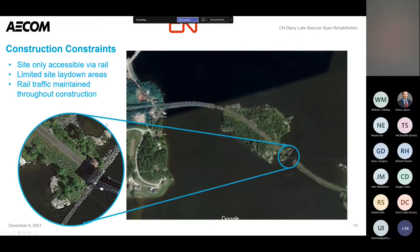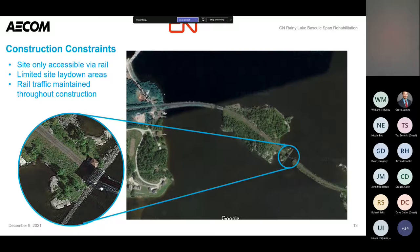Another constraint was limited lay-down areas. There is some green area adjacent to the track, but there were some decent grades, so there weren't nice flat areas to lay things down. We had to work carefully to identify good areas for the contractor. The last key constraint was maintaining rail traffic throughout construction — during winter months the bridge could remain closed, but we couldn't be interfering with the rail envelope so trains could maintain traffic throughout the project.